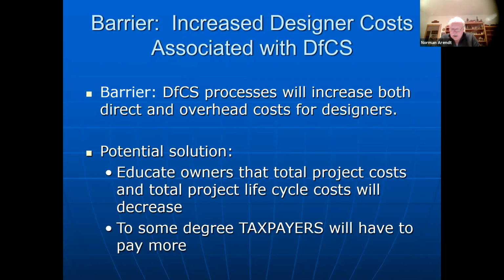There are barriers. When we look at increased designer costs, that itself is a barrier. There will be direct and overhead costs for designers. They're going to have to learn about safety. The project's going to take longer to design. But how do we handle this? Well, maybe we have to educate the owners that total project costs and total project life cycle costs will decrease. If it's easier to maintain, those costs go down. But as it says there, up front, taxpayers may have to pay more.